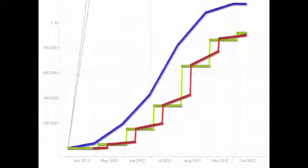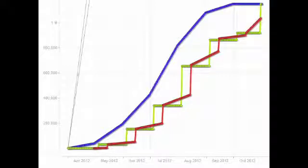This graph represents retainage being paid back after the job has reached substantial completion. As you can see, the green line, or what the contractor has been paid, meets the blue line, which is total earnings.